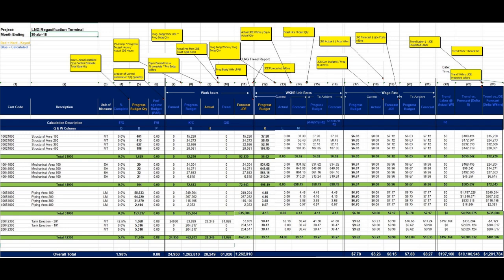Column 4. Percent complete is summarized based on the sum of earned work hours, which is the product of percent complete multiplied by the work hour progress budget hours, divided by total work hour progress budget hours. Column 5. Quantity progress budget. This budget represents the quantities from the original budget plus quantities from client-approved change orders plus the changes in expected quantity growth, increase or decrease.